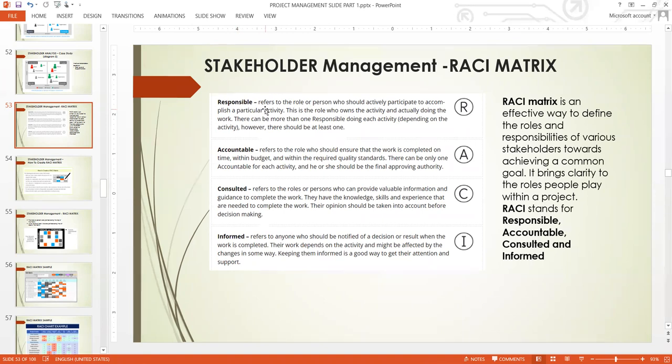With this, every stakeholder, both stakeholders and team members, know what they are doing, what their responsibilities are, and they know who is accountable. This refers to the person who ensures that the work is completed on time and on budget. So most of the time, you, the project manager, are accountable. You make sure that they do their work. And responsible is the person that is performing that task,